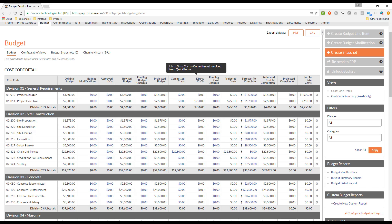To be clear, this column is designed to show you only your non-committed costs, or direct costs, for each cost code. If you choose to allow this to automatically calculate from QuickBooks, the amount in this column would represent only the costs that are not associated with a commitment in QuickBooks. Let's go back to the company level and back to the ERP Integrations tab, and I'd just like to run through each of the remaining sub-tabs that we haven't discussed yet.